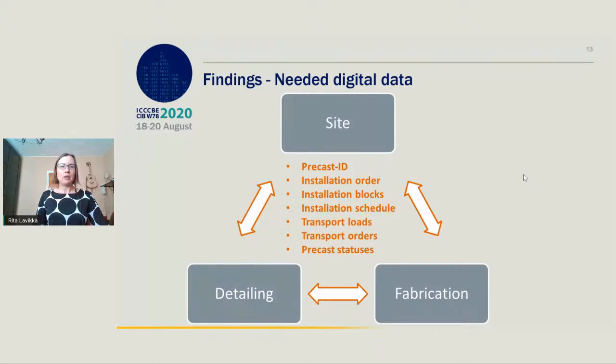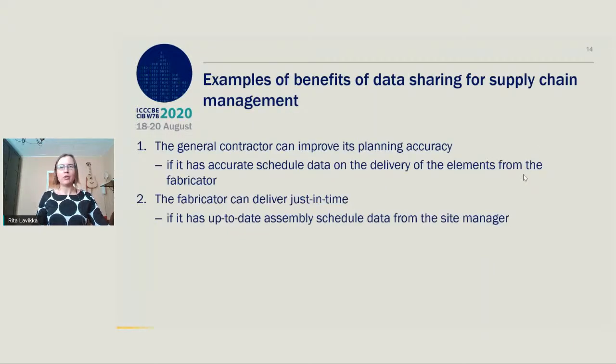Data should flow in machine-to-machine format between the companies. These are the data: identification number of the prefabricated structural element, installation order, and times of blocks, transport loads and their orders, and element statuses.